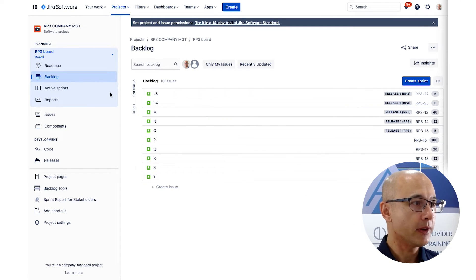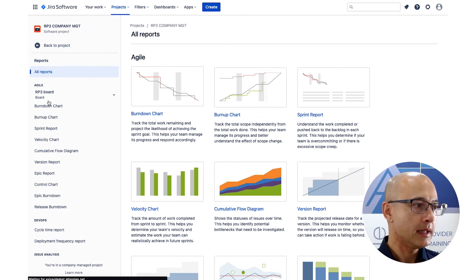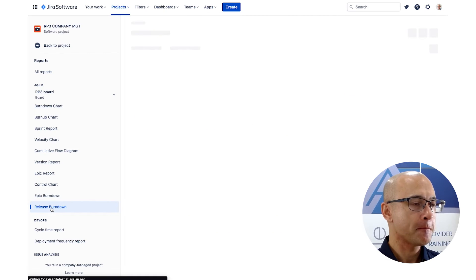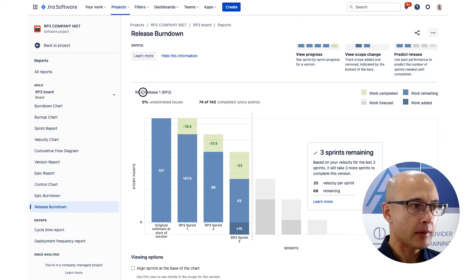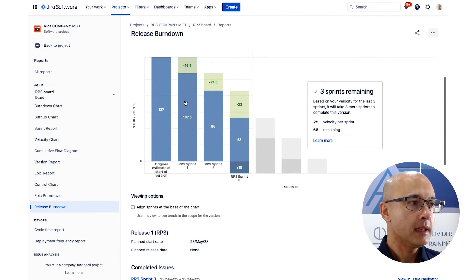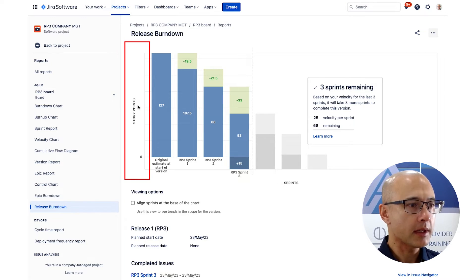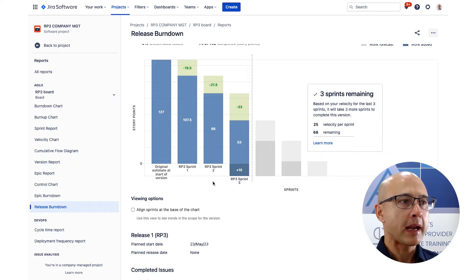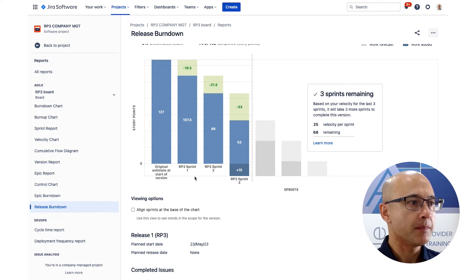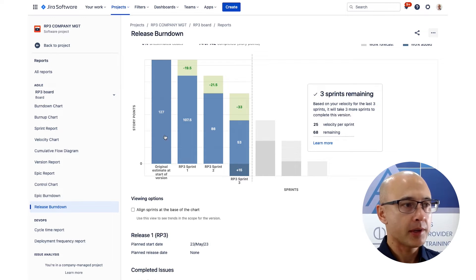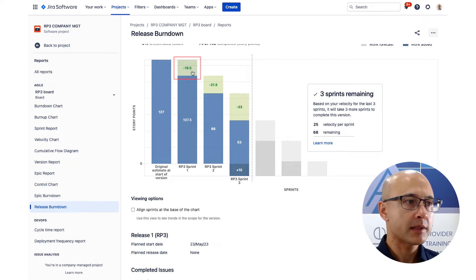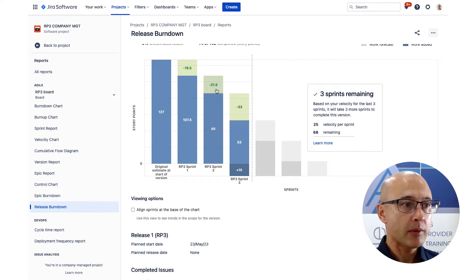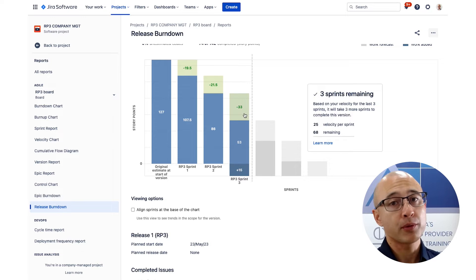Just like the version report, you'll find the release burndown under Reports, towards the bottom — click on Release Burndown. Just like the version report, we've got the release at the top — make sure you've selected the right one. We've got story points on the left and sprints across the bottom, so each bar is a sprint showing remaining points. The original at the start of the version is 127 points. In sprint one we got through 19.5 points — shown in green. In sprint two the team got through 21.5, and in sprint three we got through 33 points.